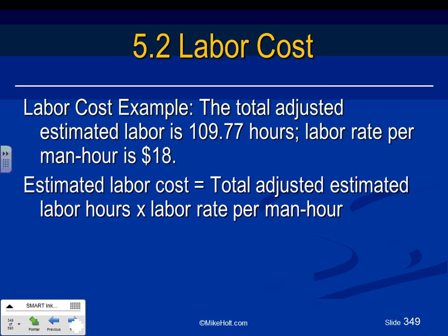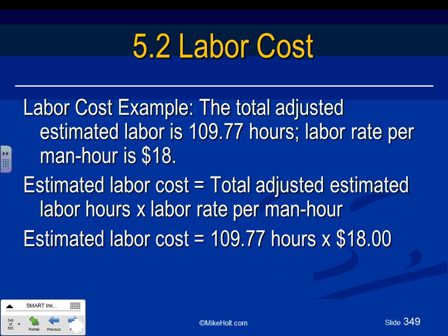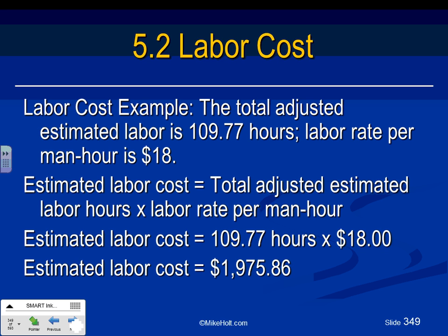And then what you do, guys, you take the hours, you have done that with me. You take the hours, multiply them by the dollars, and gentlemen, you got yourself hours by dollars, and you get yourself almost $2,000. Anybody does not know that? You guys did it with an Excel sheet. Now, where did you get the $18? That's what I like what they're saying here. Where did you get the $18? I told you guys, what did they say, $30 for the residential project? We did $30 for the residential project.